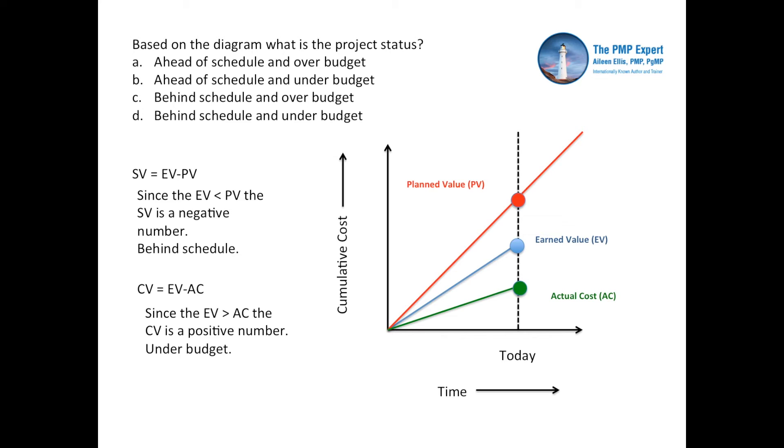Another way to word this, the value of the work completed based on the original budget is greater than the actual cost to complete the work. Let's go back to the question. We can see we are behind schedule and we are under budget.